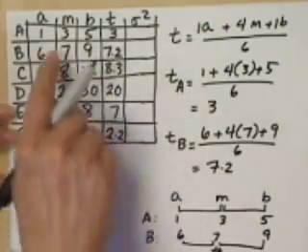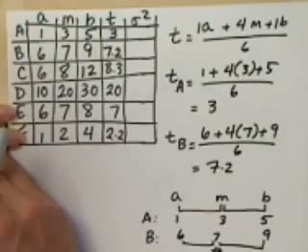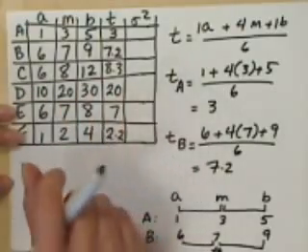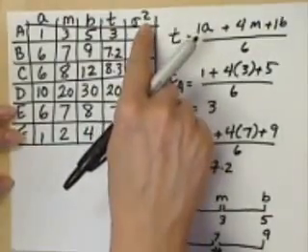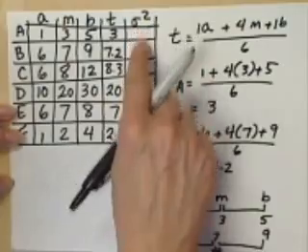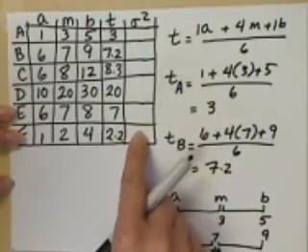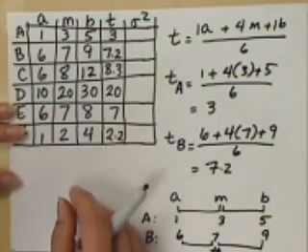Alright, once you have all of this done, then we can calculate the variance. Now remember, each of these activities is treated as a random variable. They can take on different values, and therefore we can compute an expected value for it and a measure of variation. So we can compute the variance for each activity so that later on we can use it in computing the standard deviation for the project.